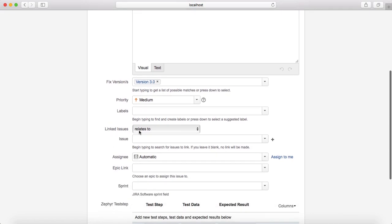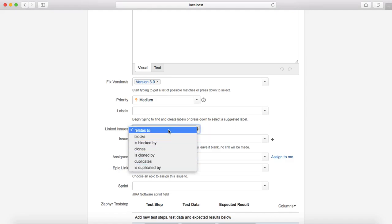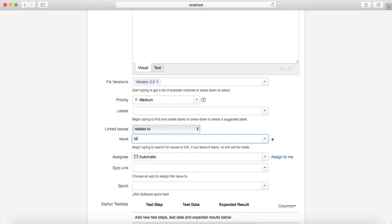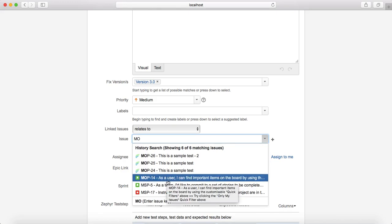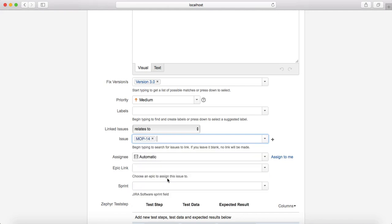Under Linked Issues, this is very important for the traceability feature. Any test case you write needs traceability back to a requirement. Select 'Relates To', then choose the linked issue — for example, this test case relates to user story MOP-14. This creates a link so you can see whether the number of test cases written for a particular user story is sufficient to cover that functionality as a whole.